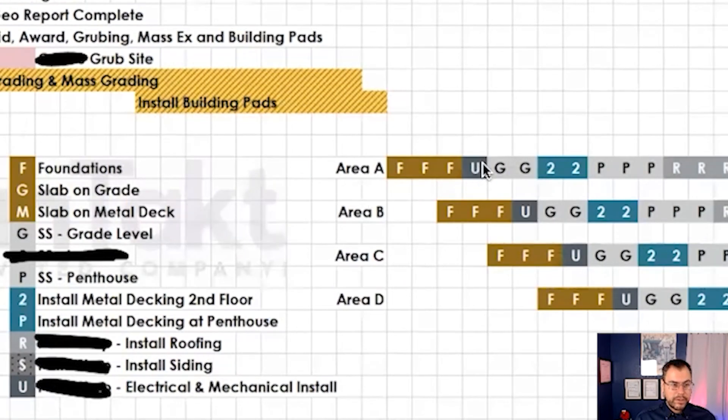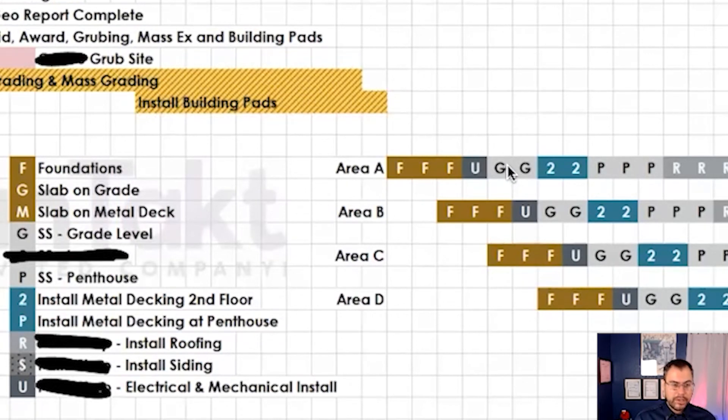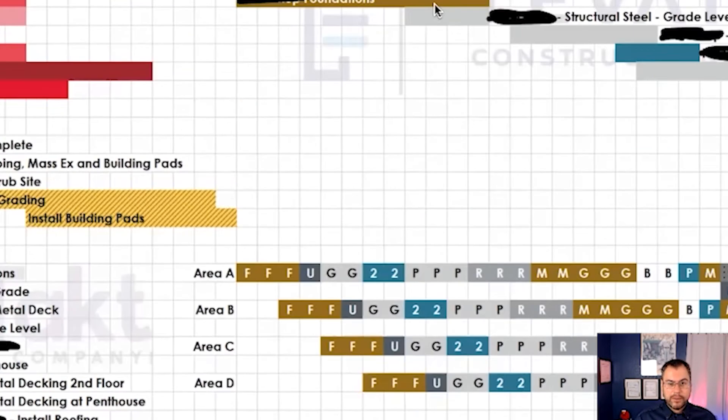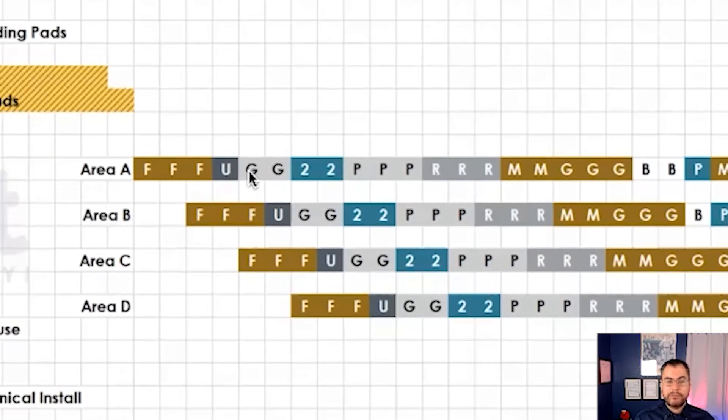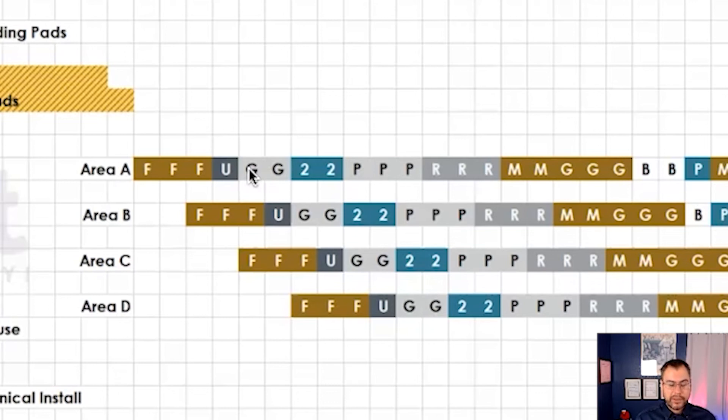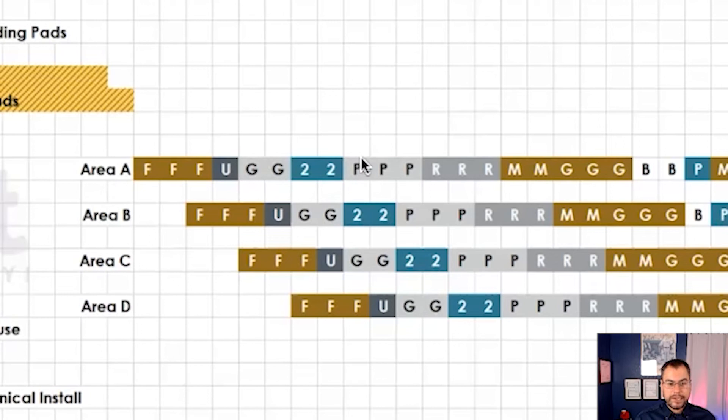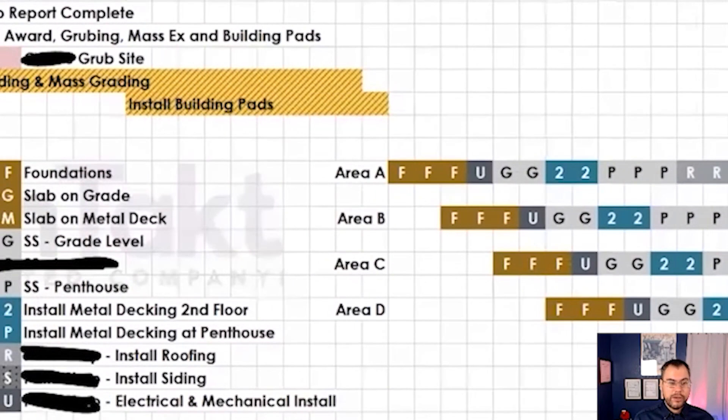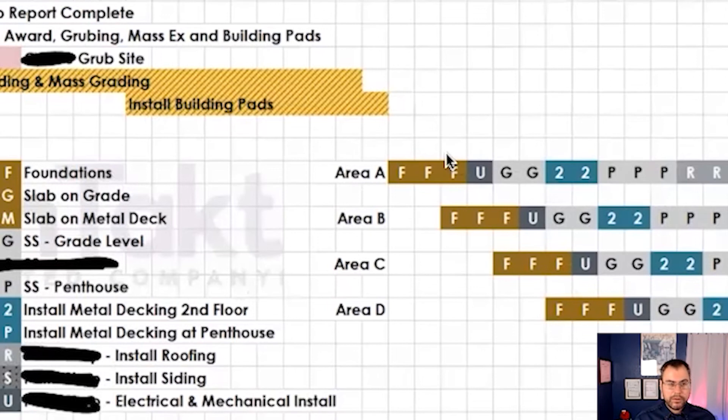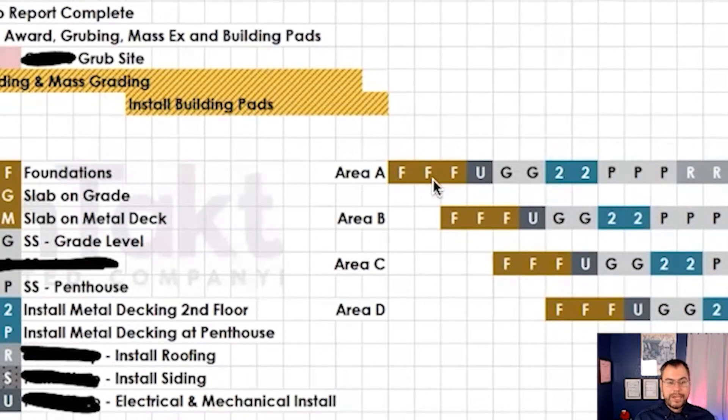Now you can see foundations here. Then we go into electrical mechanical underground. There's a little bit of it. Then we go up to grade and see, we didn't even have that here in the CPM schedule. Now we've added, that's an enhancement. We've added that in to catch that work that's going to happen with the foundations. Then we go up to the second floor metal decking. So you can see we've got the same sequence. We've only categorized it here with this simple 1 million square foot building in four areas.